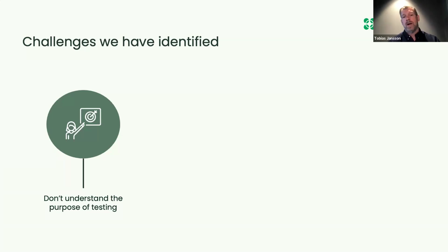Some providers will actually give you test cases to go ahead and carry out, but it is in the end your responsibility to ensure that everything is working as expected. Now, not understanding this comes with a great deal of consequence. For instance, if you do not test before you go live, you could run into some serious issues post go live that could jeopardize the entire organization, which wouldn't be very good.